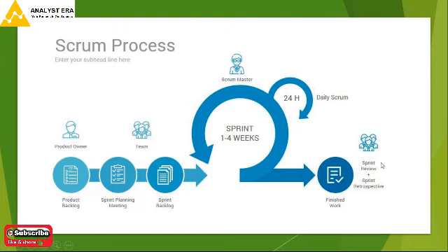That is where I will have the retrospective meeting. What is a retrospective meeting? What went well? What went bad? What are any ideas which I want to implement? Any improvements which I want to make inside my sprint? We saw a board with what went well and what did not go well, and stuff like that. That is what a retrospective is. Whatever we have learned, all of that in one slide. That is how your entire Scrum process looks.